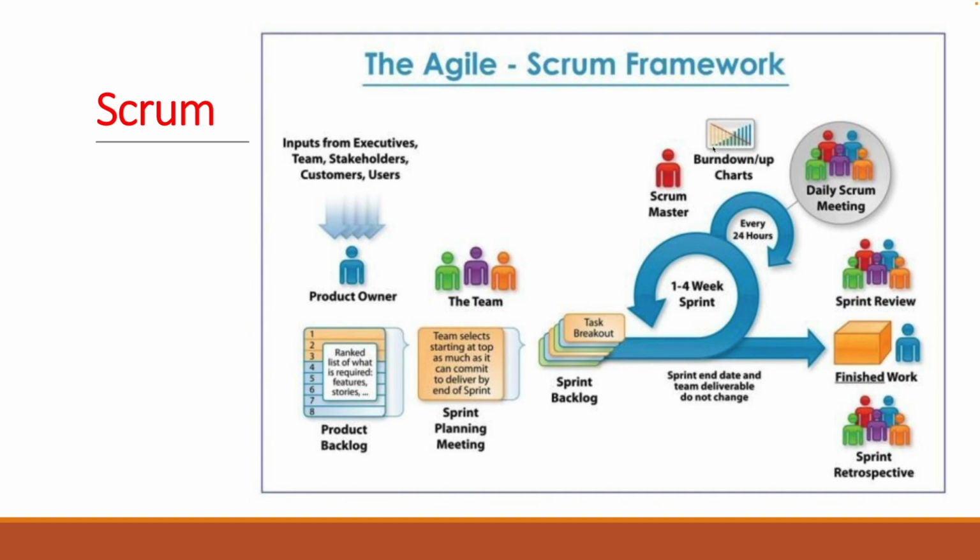You can do some things to manage the process to see how fast you're getting stuff done with your burn down charts and other charts and all that stuff. So every day you do this for the 2 weeks that you're working in the sprint. At the end of the sprint, you have a review, which means we're going to showcase everything we've built. Now, some things are very nice to demo, like it's a front end, it's a UI piece, it looks pretty. But you could also talk about the back end things that you've done that may not have a front end to show it off, but you've done it. Or you may have done some research during the sprint or whatever. So you use the sprint review to talk about what you've accomplished.